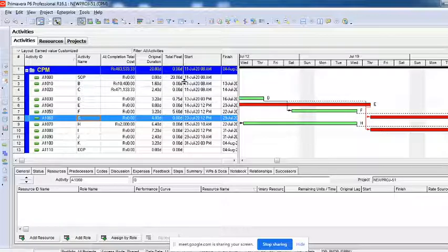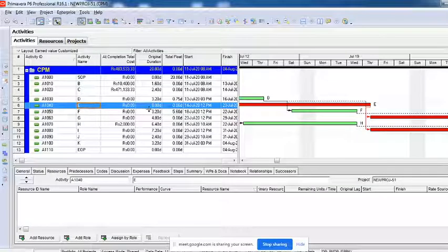Are you understanding? I'll just give an example. Assume there's an activity E here, which you have planned for 8 days. Because of some XYZ reason, now in the execution we are planning to finish this not in 8 days but in 10 days. There's a change in the plan. Now the client does not want to compare that to the 10 days you have planned.